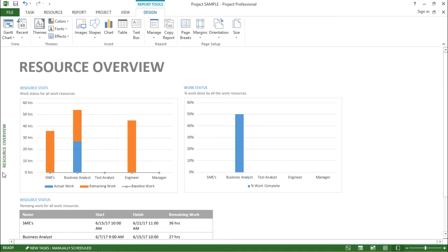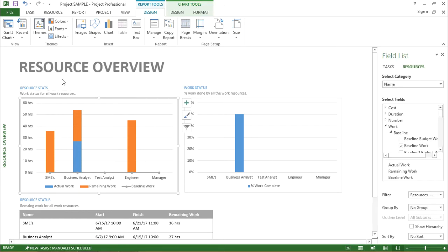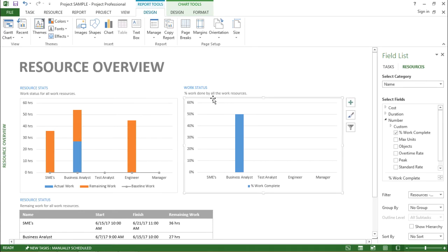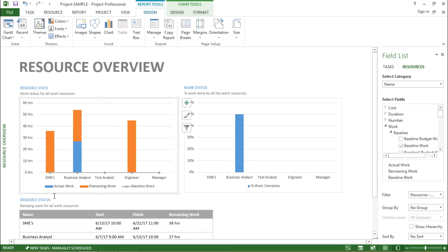Now if you see there are two charts here, the first one is showing the resource stats and the second one is showing the work status. Right here it is clearly mentioned the blue bar is mentioning the actual work, the orange bar is representing the remaining work and this is my baseline of the work.